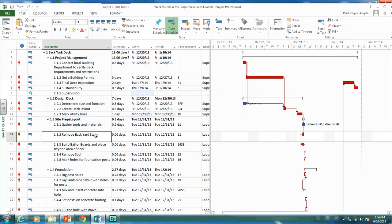One of the types of relationships and the default relationship that Microsoft Project uses is finish to start. Once I've finished getting my building permit, then I can start building my deck. So that's a finish to start relationship.